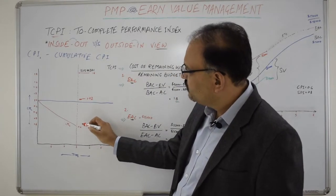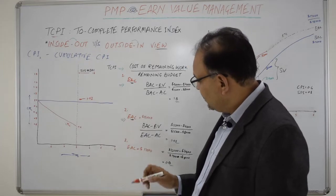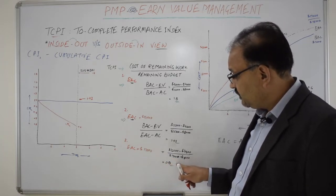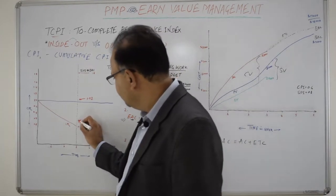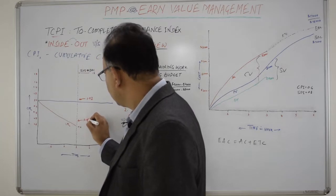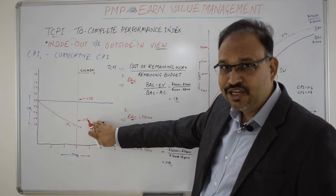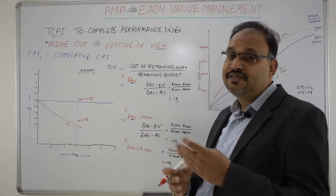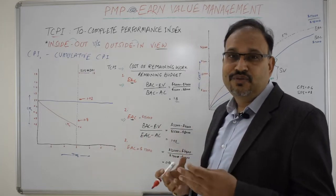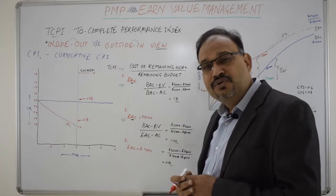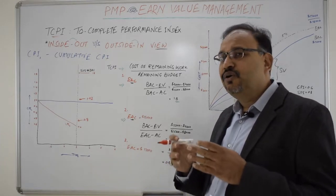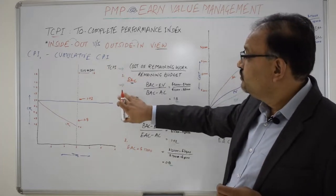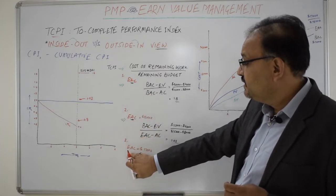In the second scenario, the BAC is revised to an EAC of $15,000, requiring a TCPI of 1.02 — a gap of 0.4 from the current 0.6, which is again highly unlikely to achieve. In the third scenario, with an EAC of $17,000, the required TCPI is 0.8 — just a gap of 0.2. This is a likely scenario if the project cuts unnecessary costs, upskills the team, replaces junior members with experienced staff, asks the team to stretch a bit, or has senior members contribute to design and coding.